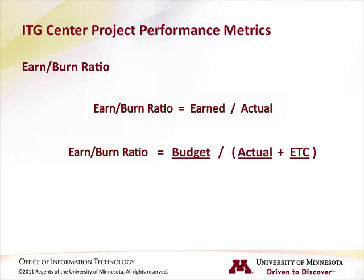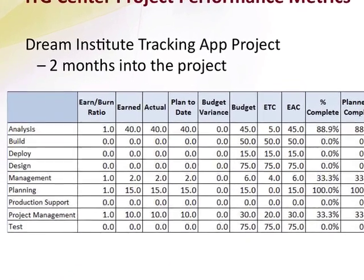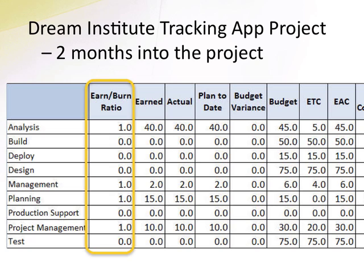Before we go any further, let's see an example of the earned and earned-burn ratio in the Dream Institute Tracking App project. The project has now completed 2 months. If we look at the earned-burn ratios, we see the value of 1 on a number of activities that have gotten underway. 1 is the ideal value and generally indicates that we are accomplishing what we had planned to do. For both the planning activity and the analysis activity, the value for earned equals actuals. This is just what we'd like to see — so far, things seem to be going according to plan.